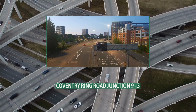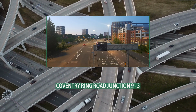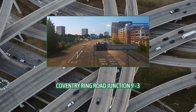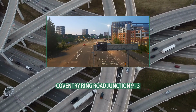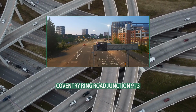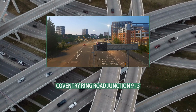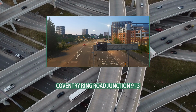The Moat Street Flyover was completed in November 1964, and it had been anticipated that it would open at that time. But with the Butts Radial Road not yet complete, the council decided to defer this, citing potential driver confusion at the southern end if complex temporary measures were put in place. Traffic was routed between Queen's Road and Spon Street via the new road slip roads for a few months, and in May 1965 the flyover opened to traffic, connecting the same two roads.